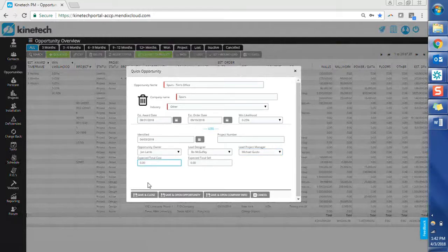And then down here, if you're trying to put this out there just so that you've got a total for your forecast, you can do that really easily by including the total cost and total sell, just so you've got a rough order of magnitude. It won't have any detail, but it'll automatically flag this quote that'll be built. It'll just be a cost and sell, one line item quote, but it'll flag it to the forecast tab so that it'll flow through there.